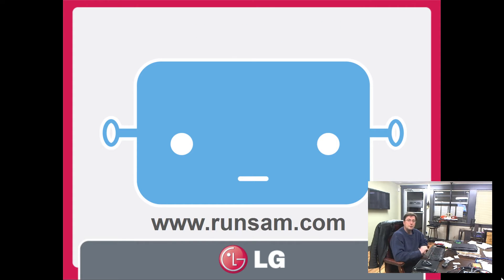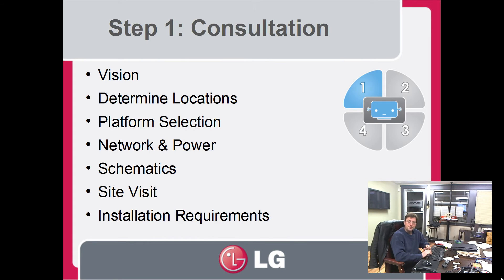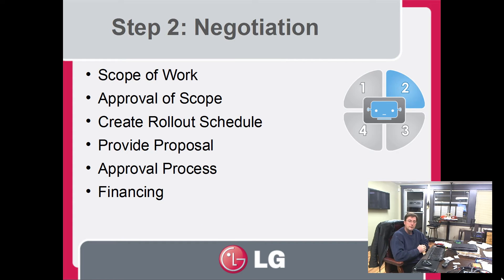SAM is a platform that allows us to track everything that needs to happen with a large-scale deployment — from the initial consultation, through to the negotiation stage, through to the actual implementation of the network, through to the things that come back to us for ongoing delegation. The consultation would be a visit, determine what locations need to be installed, choose which software and hardware platform to roll out with, what the networking looks like, powering the locations, schematics of the actual installs, do a site visit, and then look at what installation requirements are for the test location.